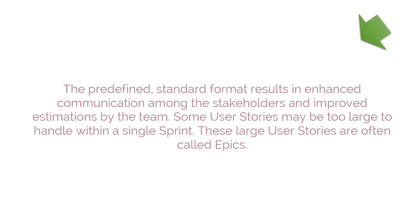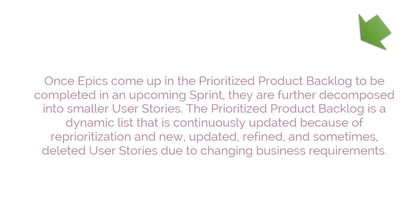Some user stories may be too large to handle within a single sprint. These large user stories are often called epics. Once epics come up in the Prioritized Product Backlog to be completed in an upcoming sprint, they are further decomposed into smaller user stories. The Prioritized Product Backlog is a dynamic list that is continuously updated because of reprioritization and new, updated, refined, and sometimes deleted user stories due to changing business requirements.